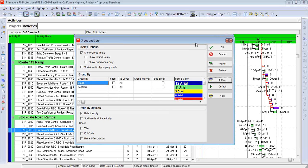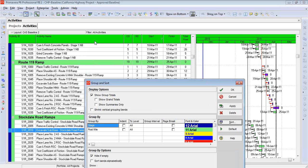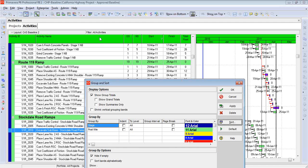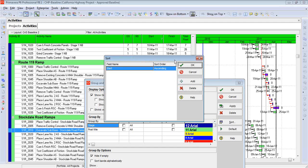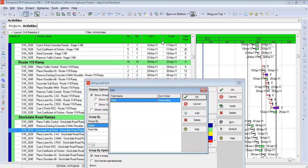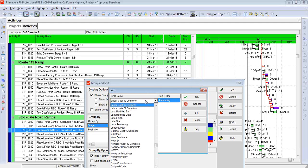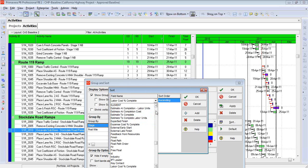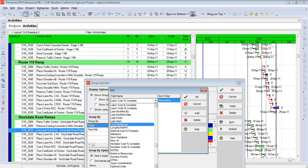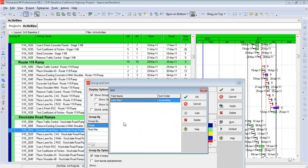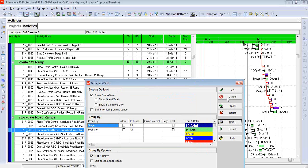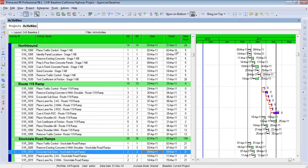Now some people don't like this. They don't like the fact that when they change by clicking on one of these columns, that it also affects the sort that's part of their layout. And people have also asked me, well, why do we even have this if it's so easy just to click on one of these columns? Well, what if I wanted to sort by some sort of data field that's not currently appearing in my table? In other words, I can sort by something like Late Start Date. Well, normally that would be impossible, let's just go down here and find Late Start, normally that would be impossible unless I add a column to represent Late Start. But now I can sort the data based off of Late Start, even though I'm not currently displaying that as a column in my activity table.